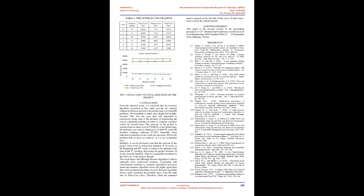It is then checked whether any new critical path has formed due to crashing. If a new critical path has formed, it is necessary to reduce the total duration of each critical path simultaneously. In this case, no new critical path has formed. Crash 2: Activity G is reduced again from 12 days to 10 days; project duration reduces from 36 to 34 days, and total cost = 253,600 TL. Crash 3: Activity G is now at its crash duration — no further reduction is possible. The next activity to crash with the minimum slope value is Activity H, with 2 days reduction possible at an increased cost of 1,300 rupees/day. Activity H is reduced from 5 days to 3 days; project duration reduces from 34 to 32 days, and total cost = 244,600 TL.